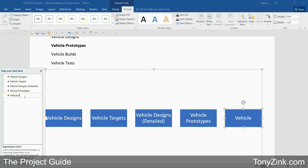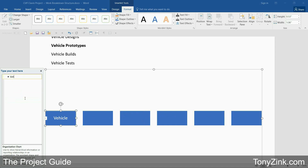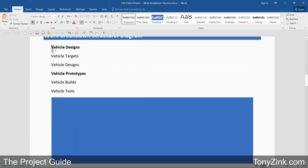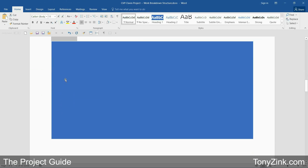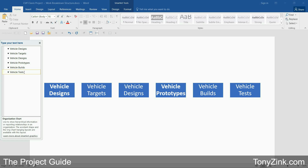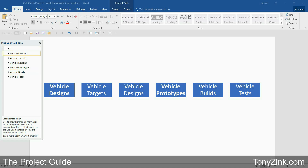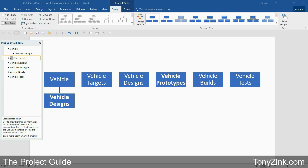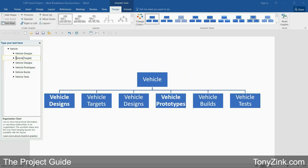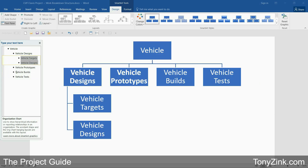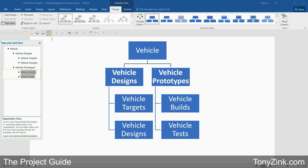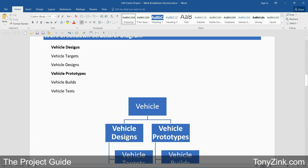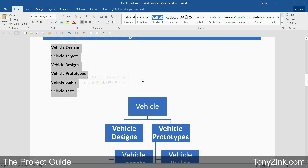If you already have your key deliverables typed into a list, then you can save yourself some typing by copying the list and pasting the key deliverables into the smart art diagram's left-hand text entry box. The key deliverables need to be organized hierarchically, so I'll add the vehicle end product to the top of the list. Then I'll indent the key deliverables to indicate a hierarchical relationship. You can indent them individually or select multiples and indent them together. If you need to create multiple levels of hierarchy, you can further indent some deliverables. Now we have the top levels of our WBS, ready to be broken down into more detailed project deliverables.